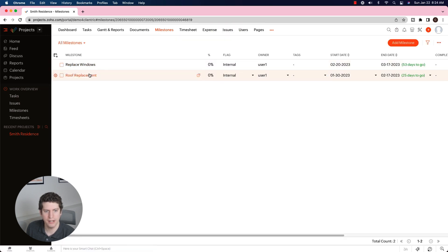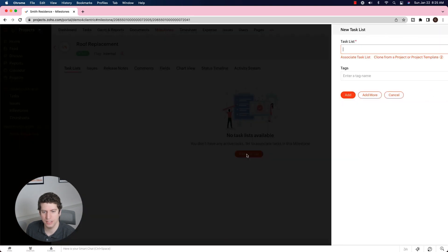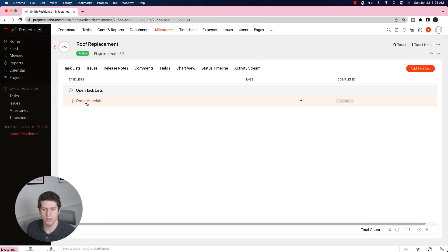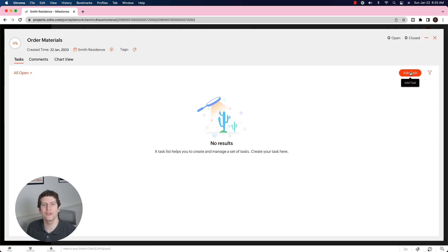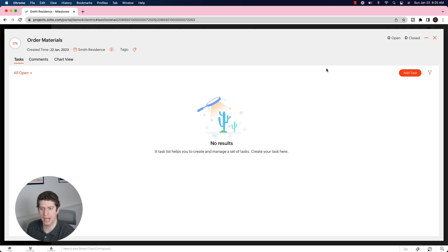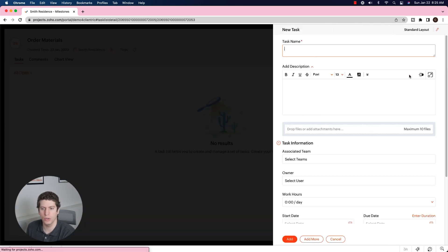Coming back to milestones, we now have two milestones: Roof Replacement and Replace Windows. Within each milestone, we can create different task lists. There are three different layers — your milestone at the top, then your task lists, then your tasks — giving you the granularity needed to track a successful project. Let's add a task list called 'Order Materials' to the Roof Replacement milestone and create a new task: 'Order Roof Materials.'